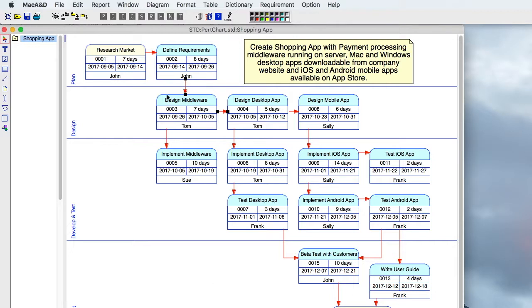Here's an example of a PERT chart where each node represents a task, giving a brief description of that task, how many days it will take to complete the task, who it's assigned to, and a start and end date.